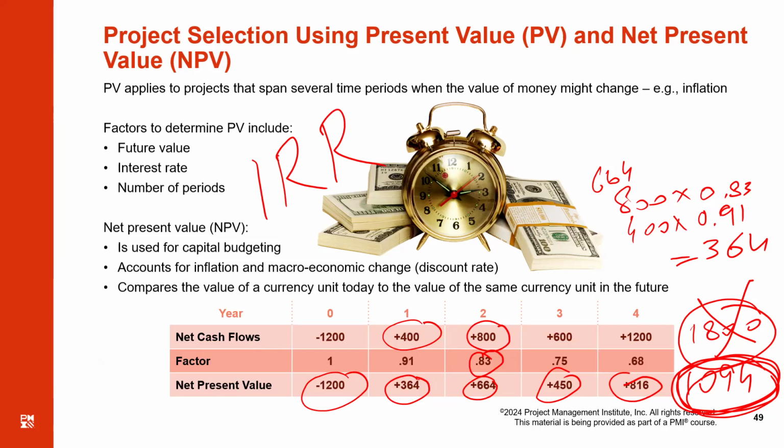And ultimately, you can home in to say it is 7.28% when you will have the exact zero value. That is my break-even point. So 7.28 is the percentage at which your project starts becoming fruitful.